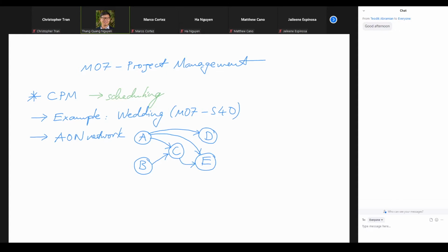So that they can cook enough food for everybody. So there's another arrow going from C to E. And finally, we go to the wedding day where we have to have entertainment and food ready, right? So there's an arrow going from D to F, another one from E to F, right? So that's the logic, the nature of the relationship among the activities in our project.